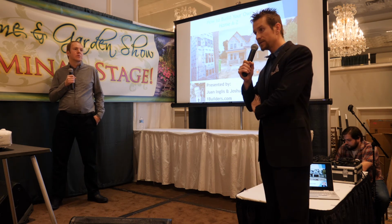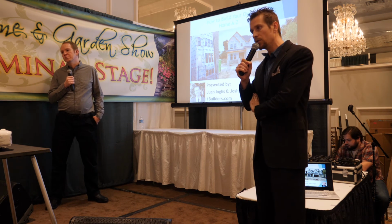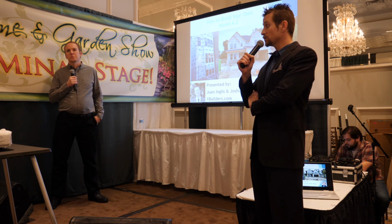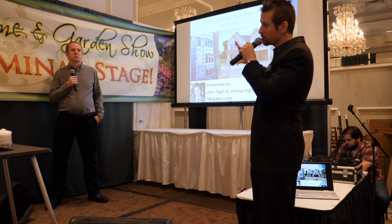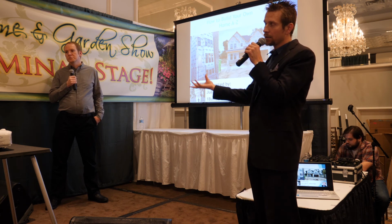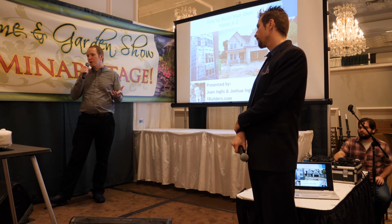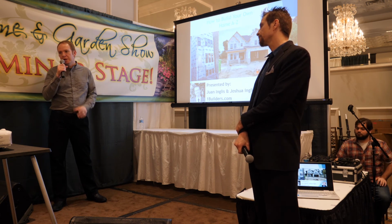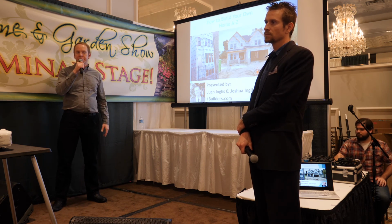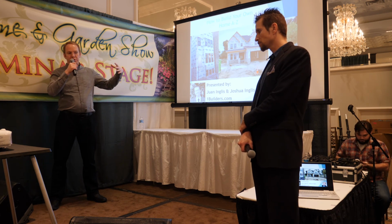So now many cities are requiring passive radon mitigation systems to be installed. And then there's active systems. Most new construction at this point, it hasn't been implemented yet, but it's a good idea to go ahead and install that system. Like Wheaton requires it. The architect has to include it, and it is a passive system, and it's part of the plumbing inspection. So the plumbing inspector will come and say, okay, you need to put the radon in here. More and more villages and cities are going there.